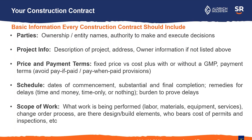If you're a subcontractor, you can have what's called a pay if paid provision, meaning the general is trying to disclaim its obligation to pay you if it doesn't get paid by the owner. That may be legal in Oregon — it's kind of an undecided area. More likely, any provision like that is actually going to be converted into what's called a pay when paid provision, so if the owner's payment to the general contractor is late, the general contractor may have an excuse for paying you late as well. When representing a subcontractor, we try to avoid those types of situations. You have certain rights under Oregon's Prompt Pay Act that, if it applies to your project, can be a powerful tool. We'll talk about that a little bit later.